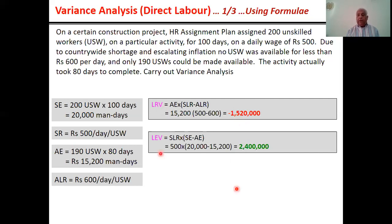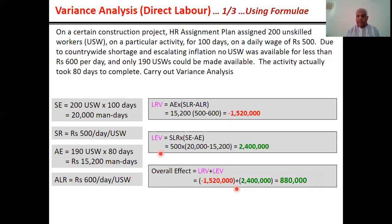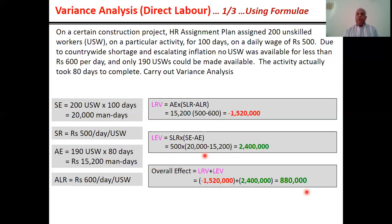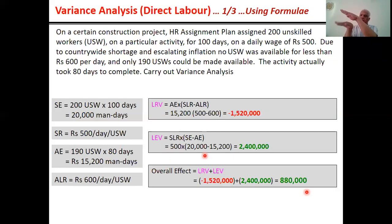Overall effect: sum of labor rate variance (negative 1.52 million) and labor efficiency variance (positive 2.4 million). Adding a negative to a positive effectively means subtraction, giving a net favorable variance of 880,000 rupees. This means the actual cost will be 880,000 rupees below the cost baseline — a saving of 880,000 rupees.